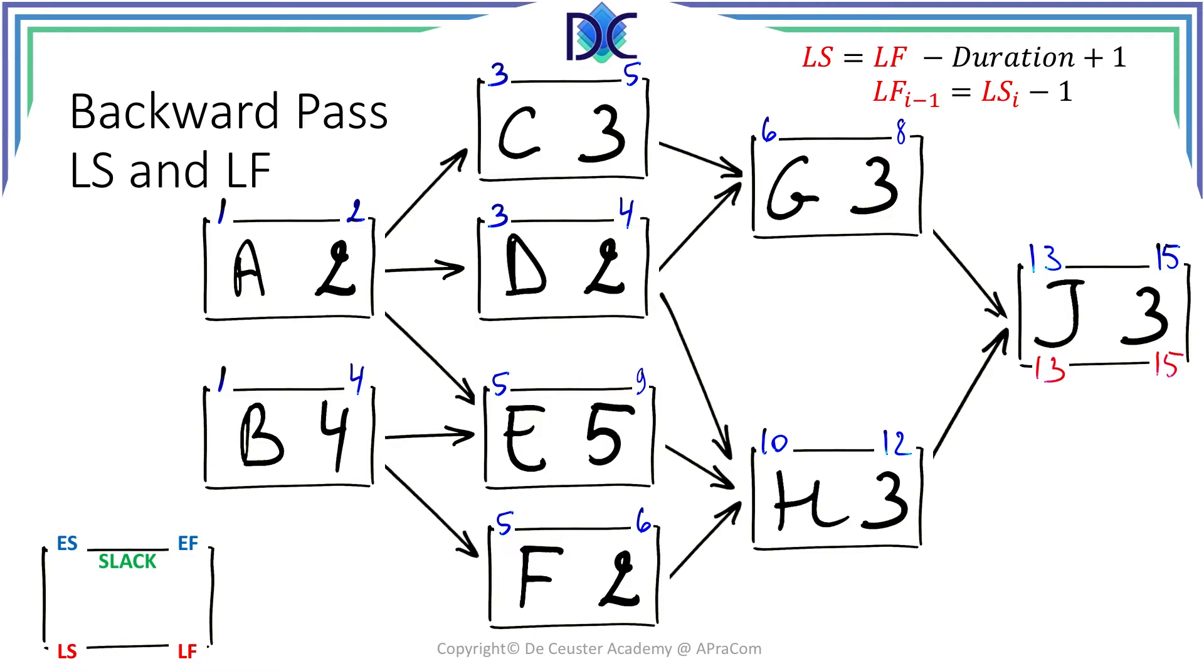The relationship between late start and late finish is given by the expression late start is equal to the late finish minus the duration plus 1, so 15 minus 3 plus 1 is equal to 13.